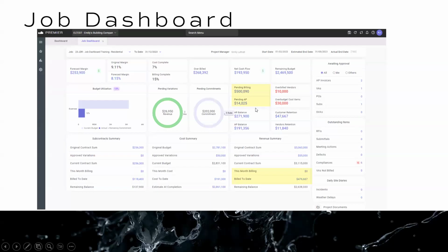The other thing is that sometimes when you create a claim, you've got to issue a stat dec to say that you've paid all your subcontractors or your bills. So by bringing this to your attention, it potentially allows you to see things that may need to be considered when you're submitting that progress claim.